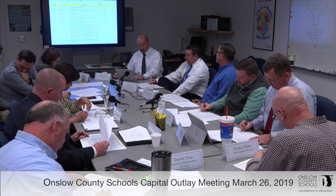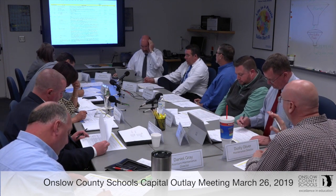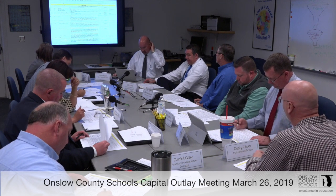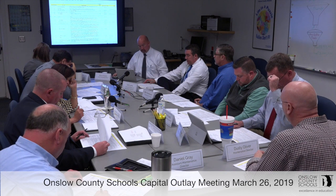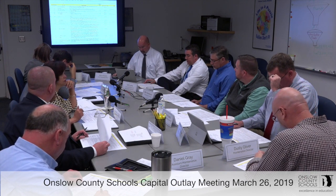Well, just leave it as a 3A right now and see how it flushes out. Yes, sir. And that's with any of these, it could happen anytime. If we can push big projects into the summer, it helps out a lot as far as instruction is concerned. All right.